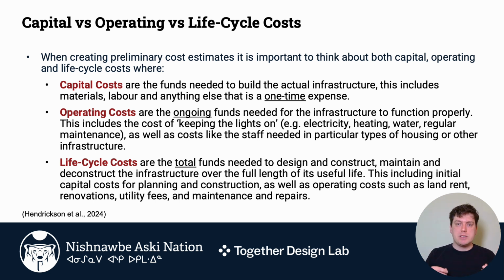And it's important to prioritize things like energy efficiency, passive heating, durable materials, and other factors that can have a really significant impact on the operation and maintenance of the house, and as a result, on the total life cycle of the house. It's important to make sure that you're getting an asset that is low cost, not just on day one, like in the capital costs, but in the total lifespan of the asset itself.